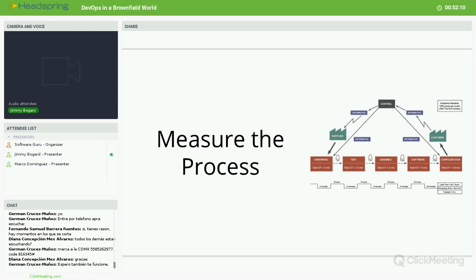So we had this release process that took a whole weekend, and I didn't really know what all those steps were, what we were doing, and really what was going on. So I wound up mapping it out and saying, what are the actual steps that are happening as part of the process? Mapping out how long it takes to perform those steps, and then also looking at the amount of time we'd have to wait between steps. So our team, for example, we weren't actually, quote, doing deployment for the entire weekend. We had a whole bunch of downtime doing nothing. And then once someone told us it was our turn to be ready, there'd be this furious activity to actually do the deployment. It's several hours. And once we were done, we would stop and just kind of wait for the rest of the deployment to be done. So understanding the entire process allowed us to say, okay, as we improve it, is the overall process improving?